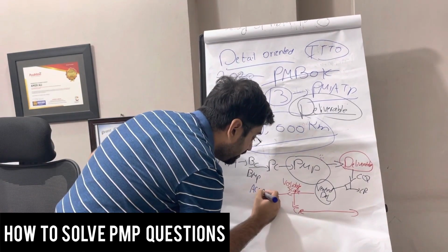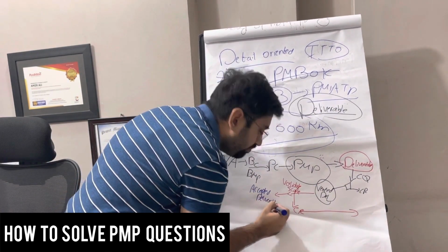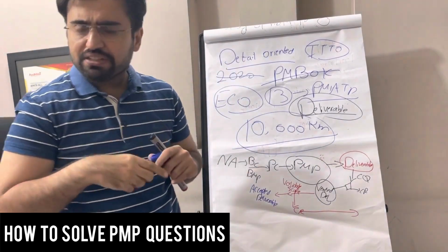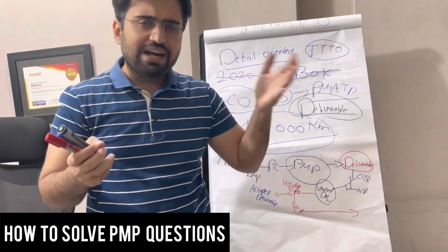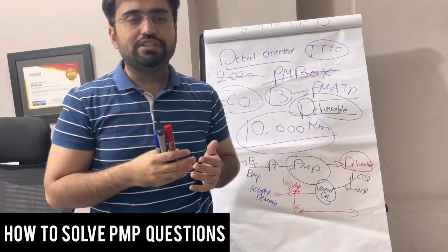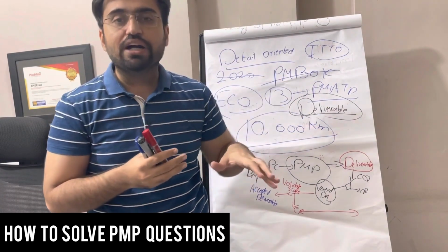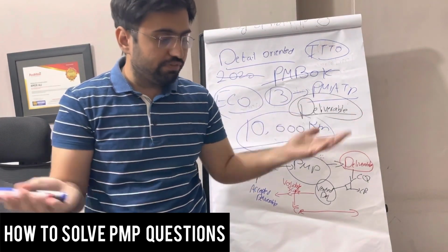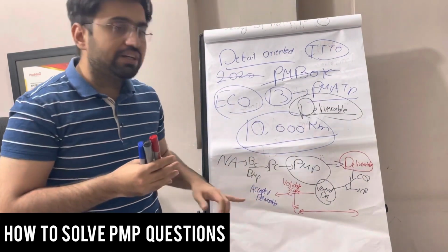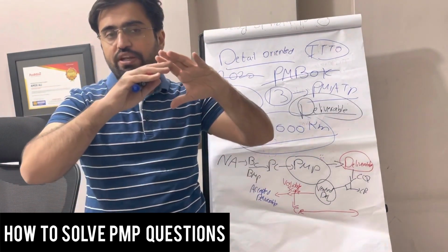Accepted deliverable. Now in most projects, we need more client collaboration. Even in a predictive project, we don't want the client to come at the end, see the entire building and say, I don't accept it. We try to have collaboration. We made the stairs, we ask the client, okay, check it. We make the foundation. So accepted deliverable applies to each individual deliverable also.